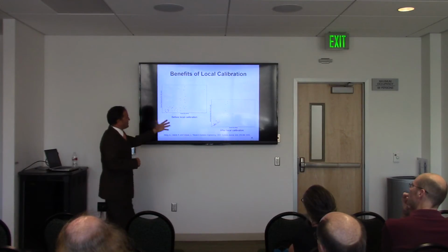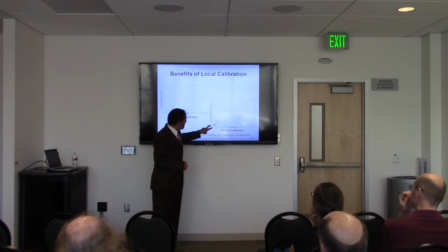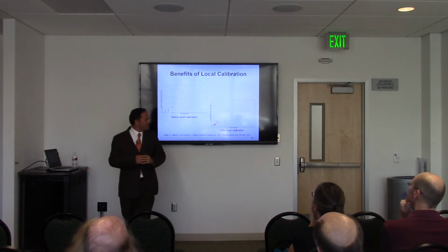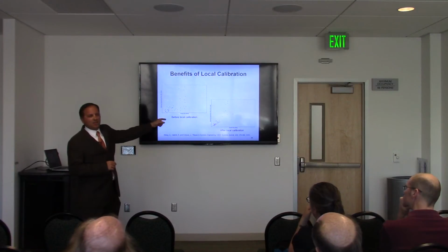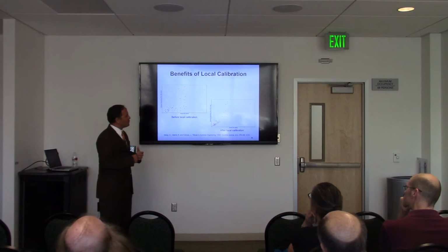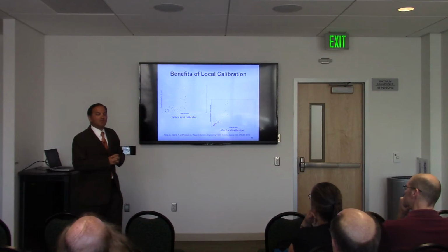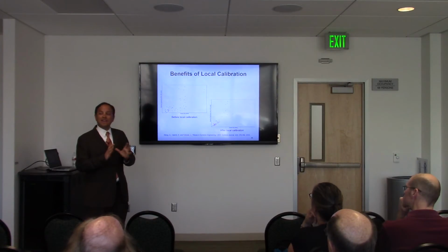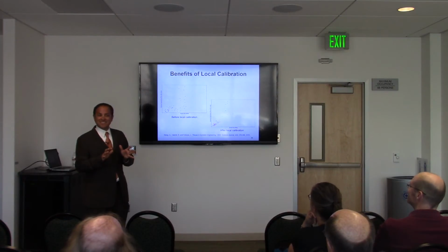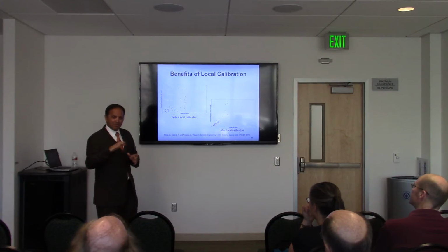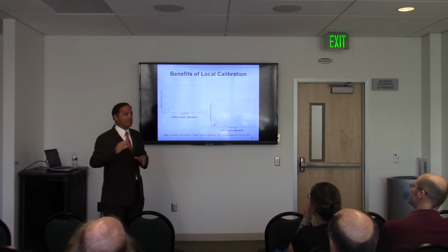In statistics, this is heteroscedasticity, meaning that the larger the data gets, the more spread that you have from the mean. We can live with that, though, because that means that we have optimized the data that we have, and we've minimized the error. But let me tell you what's acceptable in terms of error in cost modeling. If you're off by plus or minus 20%, you're really good. This is the acceptable metric in cost estimating. Now, notice what I said, plus or minus 20%. That's a swing of 40%.